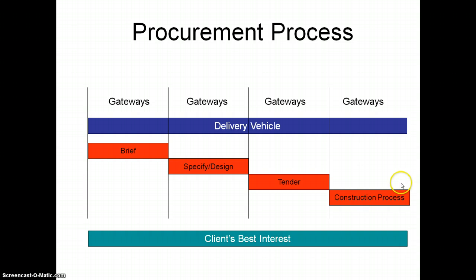Well, they're here. First of all, not in any particular order, but they're in the construction process. Have you defined the deliverables? Have you defined them as their key elements? How are they broken down? How are they used? The next thing is the tender process and the specification. Now what I've shown in this model is that I do all my specification, then I go to tender, then I appoint. You can have different models here. This can be configured however you want, and the best way to deliver this part. There are marks in here for how this is delivered. How you configure it and how you deliver it.